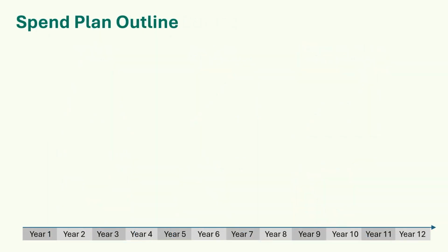How to start a project spend plan using the bell curve method. You need an outline of your schedule with the major milestones. You should know when preliminary engineering was authorized to start, and you should know your approximate advertisement date. While every project is unique, you can most likely assume the preliminary engineering, including environmental and permitting, will occur between these two milestones, and likely extending a few months past the ad date to accommodate final preliminary engineering closeout.